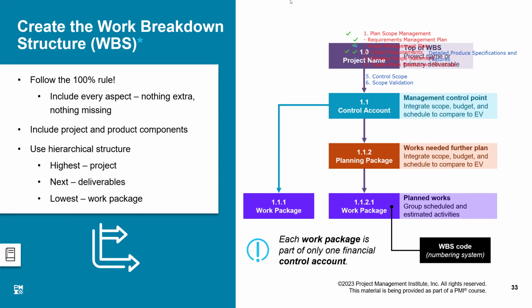A job is considered done when it is 100% complete. Otherwise, it is considered not done at all. Meaning, the progress of that work will be considered 0% until it is 100% complete. The moment it is completed, we will say, okay, the progress is 100% on this task.